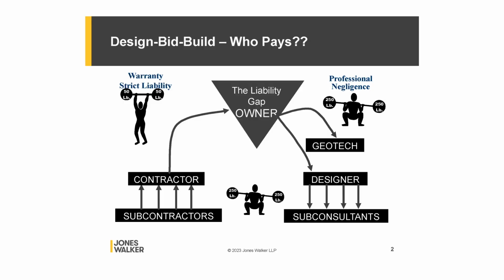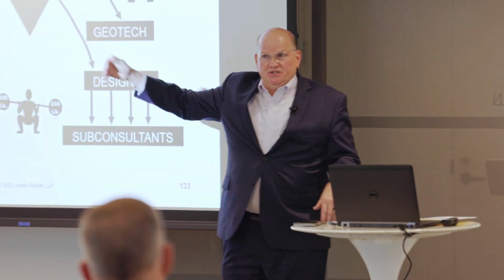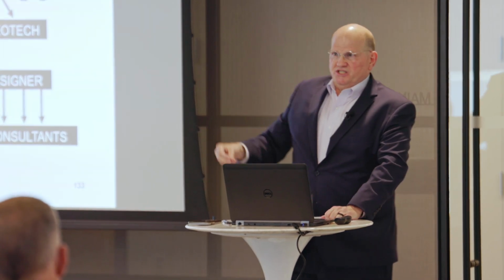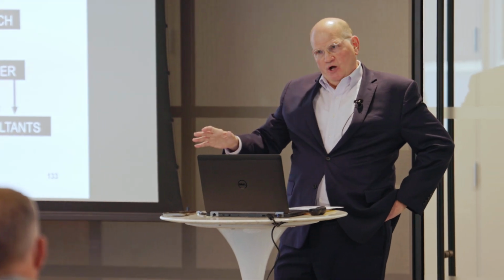Now flip to the other side. The owner is like, wow, I'm paying $1 million, $5 million, $10 million for a defective design, but I didn't design anything. I paid maybe millions of dollars to the designer to design it. So I'm going to say, you're going to have to pay the $10 million for that defective design. And the owner is in a completely different situation, because virtually every insured professional design project is going to establish liability as a matter of law.